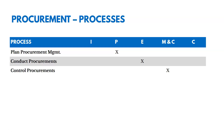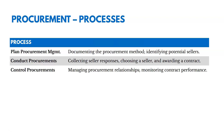There are three processes in this chapter: Plan Procurement Management in planning, Conduct Procurements in Executing, and Control Procurements in Monitoring and Controlling. In Plan Procurement Management, we're documenting the procurement method and identifying potential sellers — determining what we're going to do ourselves and what we'll get help from others to do. Conducting Procurements is about collecting seller responses, choosing a seller, and awarding a contract. Then Control Procurements is about managing procurement relationships and monitoring contract performance to make sure the seller is fulfilling their obligations.